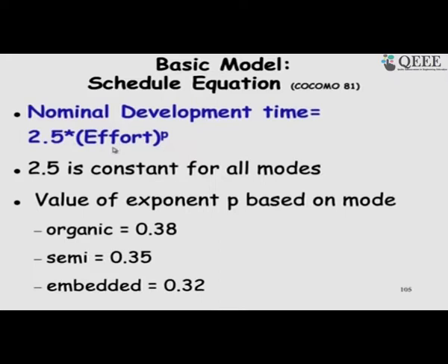The proper way, which we will see later today in this lecture, is that it should follow a Rayleigh distribution. So, there is an initial deployment of a few developers at the start of the project, and then as the project progresses, we hire more and more people, and then towards the end of the project we reduce the team size. That we call a proper deployment of staff, and that leads to the minimal development time.